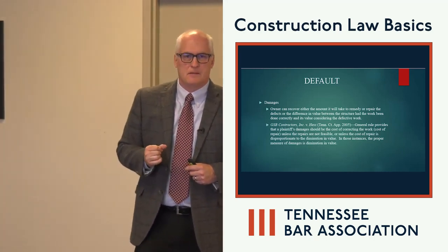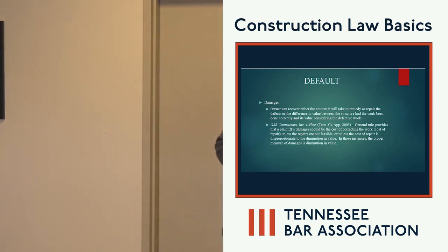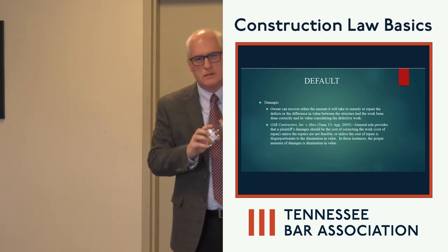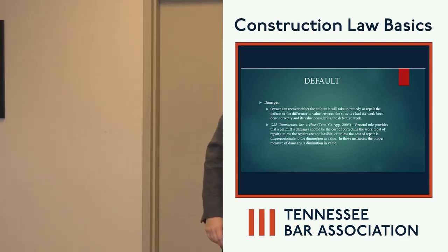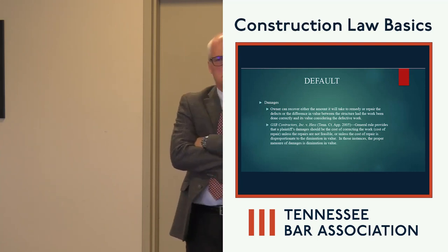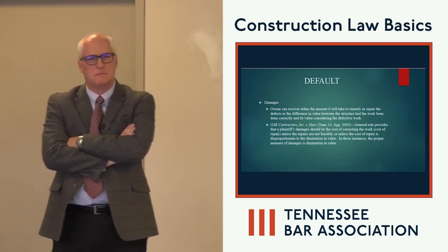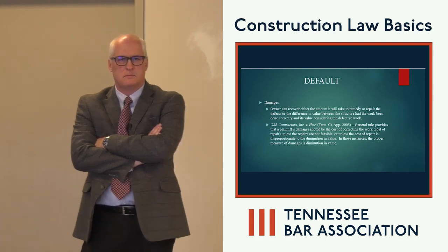I did have to look at this recently, and on behalf of the owner, you do give the notice. Remember, the construction defect notice statute does not apply to residential construction. A lot of people don't know that. So it's not under that statute. You do have to give notice, but what you get back as to the cure and the timing can't just be, yeah, we can fix this for $5,000 and we'll get back to you when we might be able to do that.